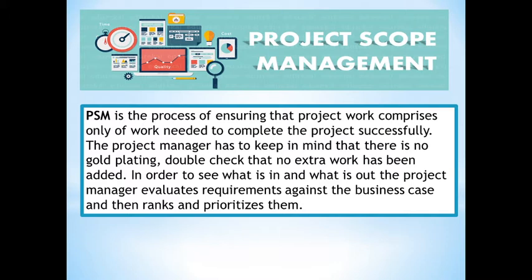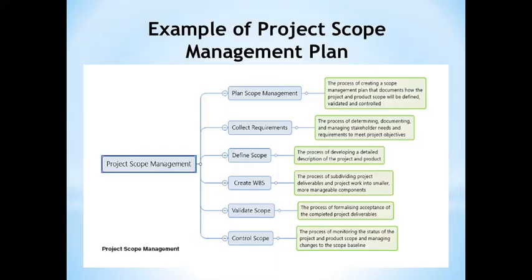Here is an example of a project scope management plan. First, plan scope management — this is where we focus on how to plan the scope management activities. Next is collect requirements: the process of determining, documenting, and managing stakeholder needs and requirements to meet project objectives. This is one of the most important processes, where we reach out to stakeholders to identify their needs and requirements.